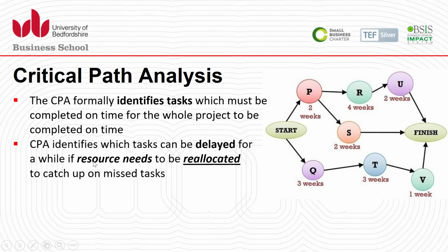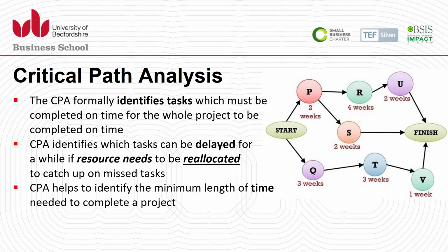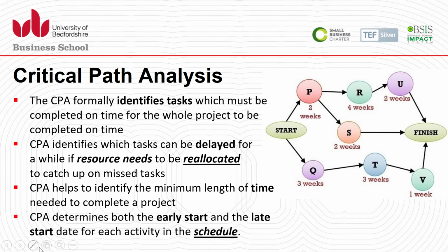CPA also helps to identify which tasks can be delayed for a while if resources need to be deployed or reallocated to catch up on a missed task, or a task which is critical and needs urgency or priority to complete. CPA helps to identify the minimum length of time needed to complete a project, and CPA determines both the early start and the late start date for each activity in the schedule.